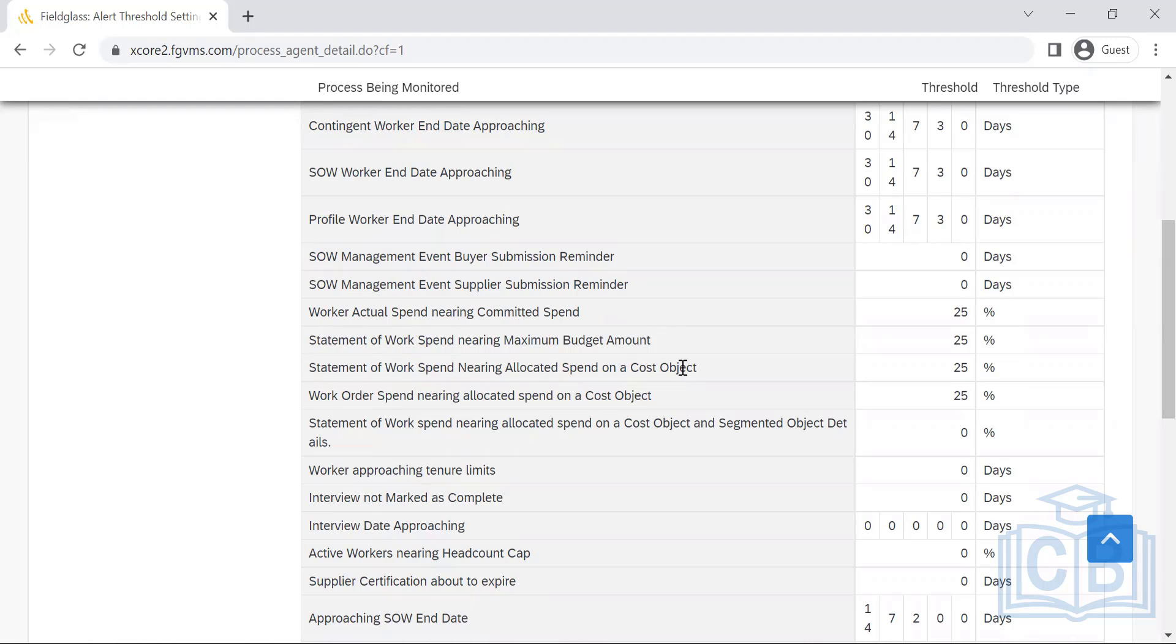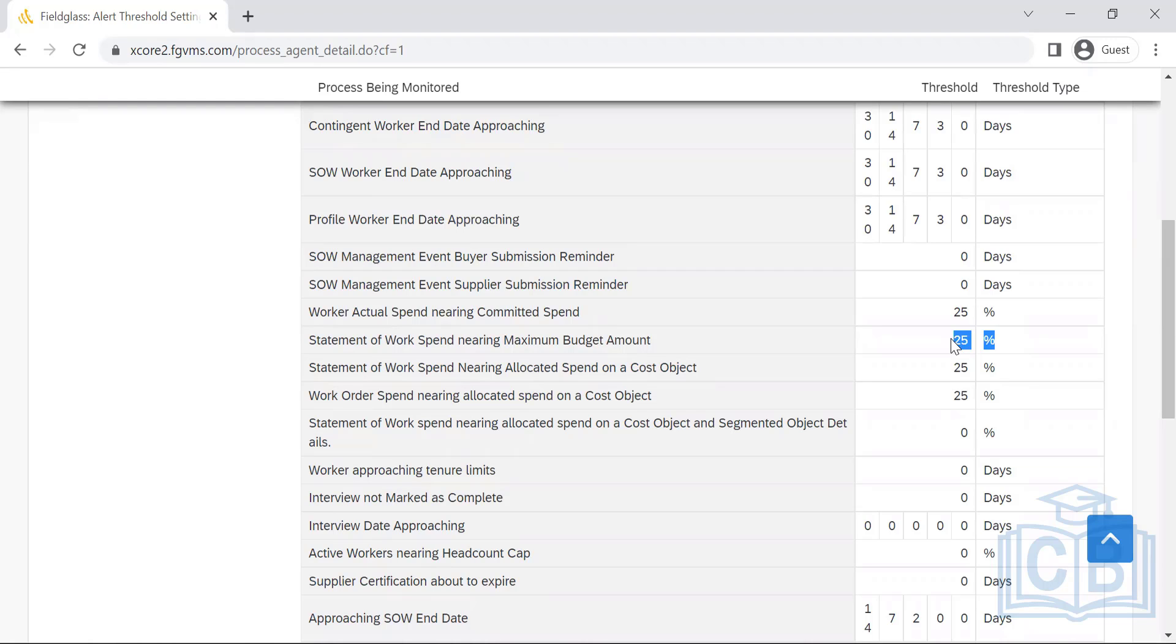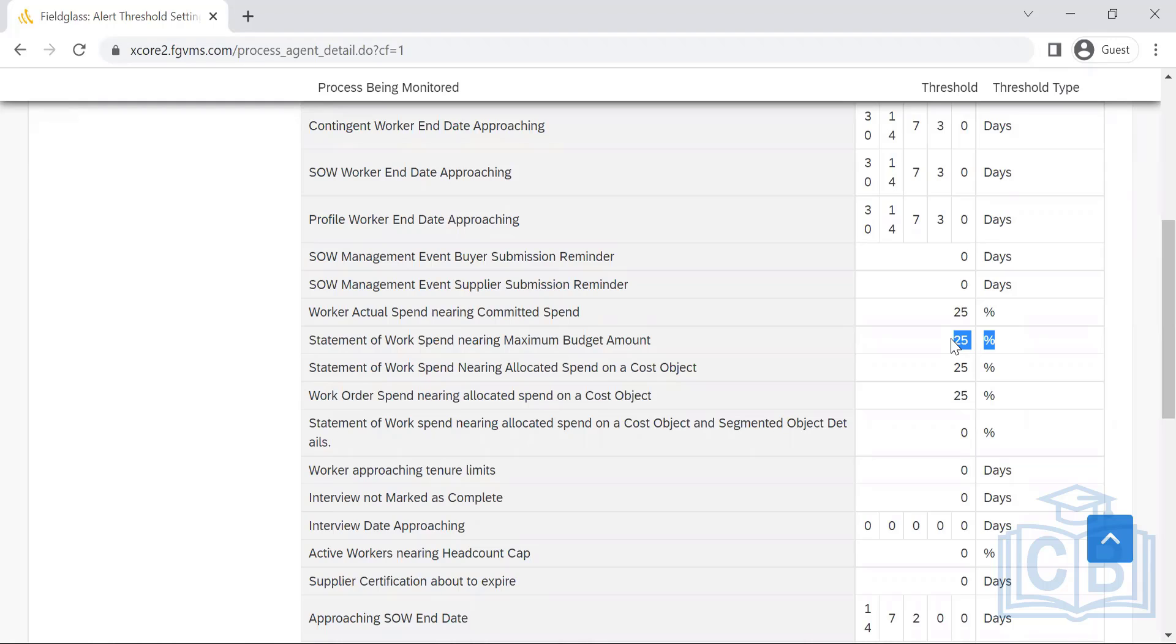Statement of work spend nearing the maximum budget. Statement of work—when it comes to the CW contingent worker, it is the individual work orders. When it comes to the SOW, it's a bunch of work orders under that particular SOW. So here the total budget will be nearing whatever the total budget that's been set for that particular project.